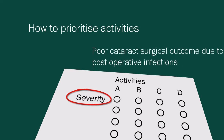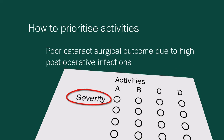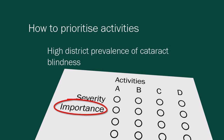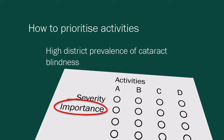Severity: for example, if cataract surgical outcome is poor due to high post-operative infections, a severity score of five points would be valid. Importance: this category is based on local need, so for example a high district prevalence of cataract blindness might be awarded three points.